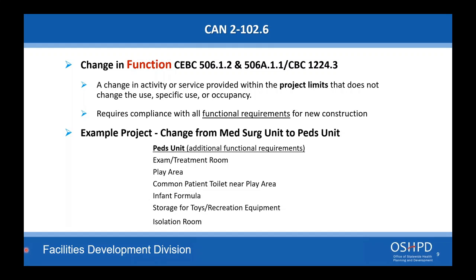So if your med-surg unit is being converted to a pediatric unit, you only need to provide those additional functional requirements. All the existing functional requirements, the patient room is still a patient room, does not have to be upgraded. Okay, so only looking at the new functional requirements.